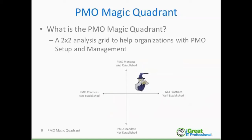Like any other analysis construct, the PMO Magic Quadrant is a two-by-two grid intended to help organizations with PMO management. On the Y-axis is the PMO mandate — is it well established or not well established? The PMO mandate is the qualified purpose and value of the PMO as established and unanimously agreed to by the leadership team. It's a binary choice: well established, yes or no.